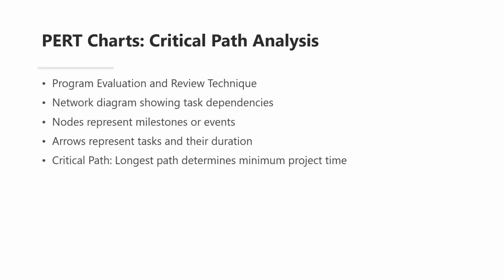The key advantage of a PERT chart is that it shows dependencies. Some tasks cannot begin until other tasks are finished. For example, you cannot begin staff training until the curriculum is developed. PERT charts make these dependencies explicit.